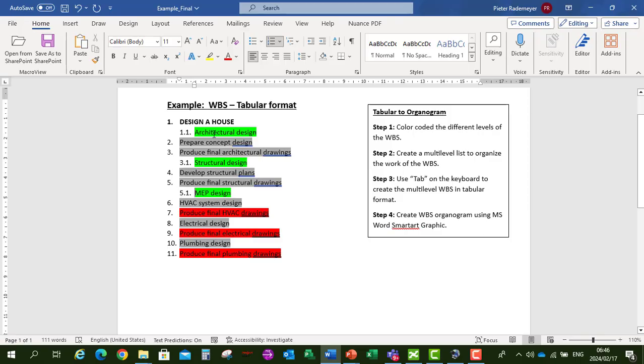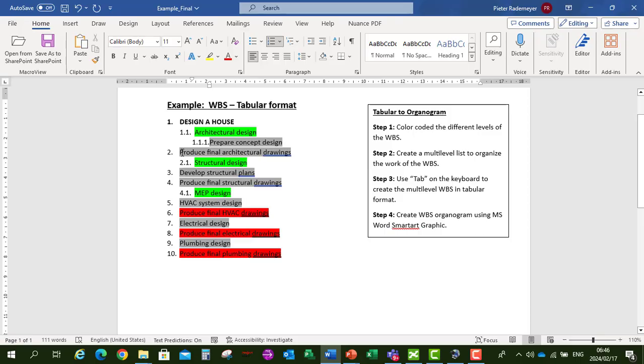Now on the Architectural Design, the second layer, we've got Prepare a Concept Design. Tab twice. And Produce our Final Drawings. Tab twice.